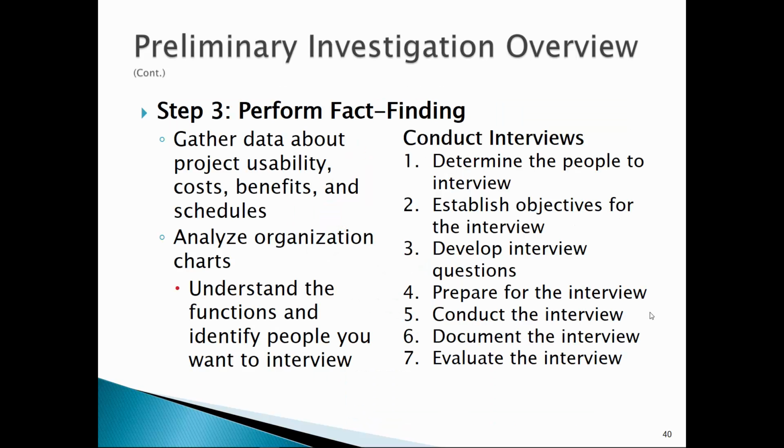Perform that fact finding, so gather the data. I'll just pause on this. I want you to read it. We need to analyze data that we have in existence today. It might be the existing performance, say, of a server. We might have a baseline of the existing server, and we can calculate what the new server would be able to do. Then we look at the cost. Then we look at the benefit. Then we analyze how long the server would be in place, and finally decide if it's a project to do in replacing a server. So we can conduct interviews.